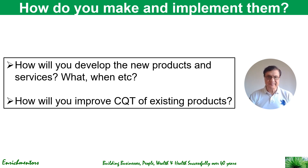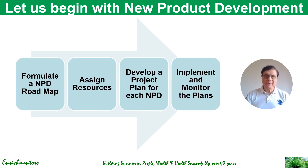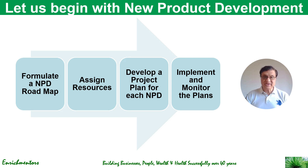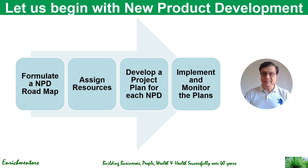Let's begin with new product development and give you an overview of how to develop new products and services. Basically what you need to do is formulate an NPD roadmap, and this comes primarily at the senior management level of R&D — if you are an R&D director, it would be your primary responsibility. Then you need to assign resources, and for each new product you need to ensure your team develops a project plan for implementation, then implement and monitor the plans. Those are broadly the four steps: formulating the NPD roadmap, assigning resources, developing a project plan for each NPD, and implementation and monitoring.